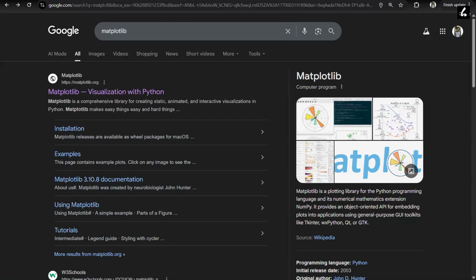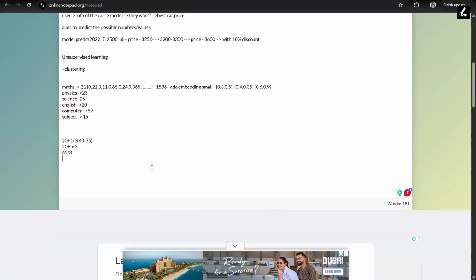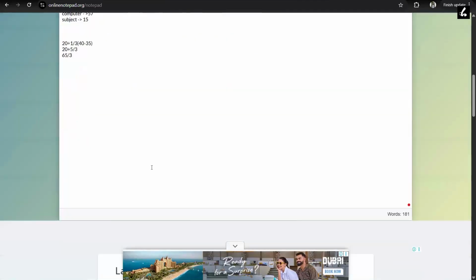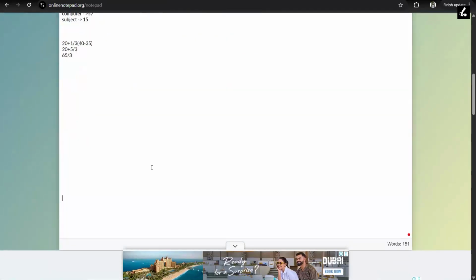After I create my WBS or whatever, I do some of the sequencing on what will happen, building out what I call placeholder user stories that get filled in and groomed at a later time, just so that we can understand what we're trying to get accomplished at a high level. Those are other tasks that I do.